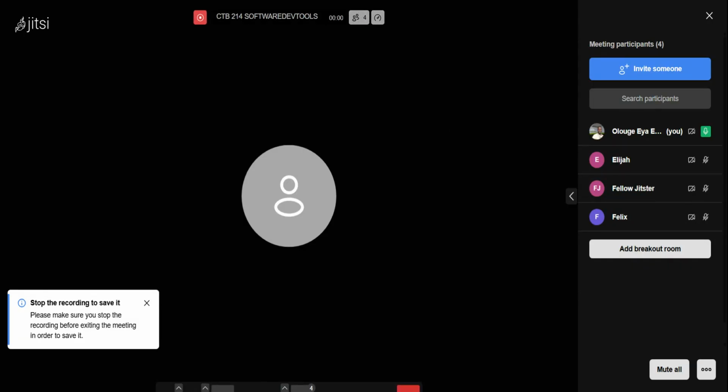Next. Like I was saying, another example, the same thing applies. Development phase 4 depends on design according to this arrow here. If you look at the arrow leaving design and coming to development, it means on your Gantt, you will double click on development after adding it. Then you go to the predecessor tab and select design as its predecessor. You do the same for testing and validation. You double click on it and also select design as its predecessor according to this arrow. Repeat that process for all predecessors according to the Gantt chart.